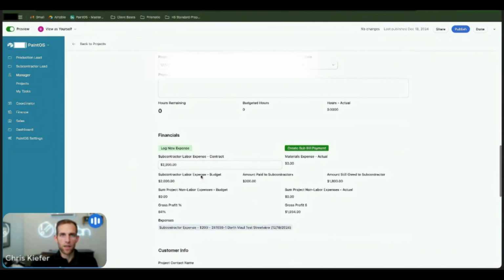And then the budget. So this is the contract amount, meaning like of the original contract that was sold. This is including any pushback. Are you guys going to allow that, Sean? No. Okay, so pushback's irrelevant, but it would include any additional change orders that have been added. So the subcontractor amount on the change order would get added to the total here. So the budget is basically the original plus any changes that have happened to get you your budgeted amount to